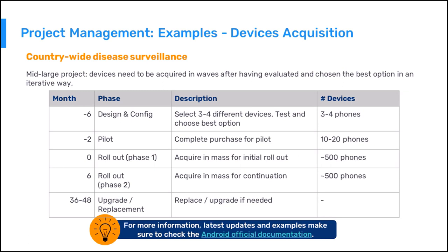In the second scenario, many more devices are needed, and an example strategy could be: acquiring three or four devices for the design and configuration phase, ideally with different specifications within a given price range to choose the best option; acquiring 10 to 20 devices based on the pilot plan; then mass acquiring around 500 devices for the rollout, where a large volume may enable good deals or promotions; acquiring the remaining 500 devices; and finally proceeding with replacement or upgrades when needed. Please note that these are general guidelines and more information is provided in the official documentation.